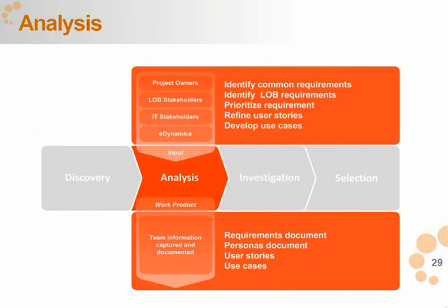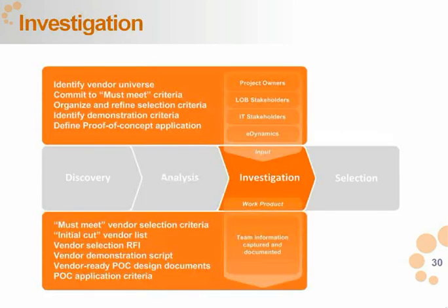And these are tools that we will then use to develop other things like the RFI and the demo scripts, and perhaps a proof of concept document that we will ask vendors to participate in. So in the investigation phase, we now take all these refinements that we have around the requirements and the use cases, and we begin to think about, okay, what's the universe of vendors out there in the various platform categories, CMS, marketing automation, search, maybe it's e-com,